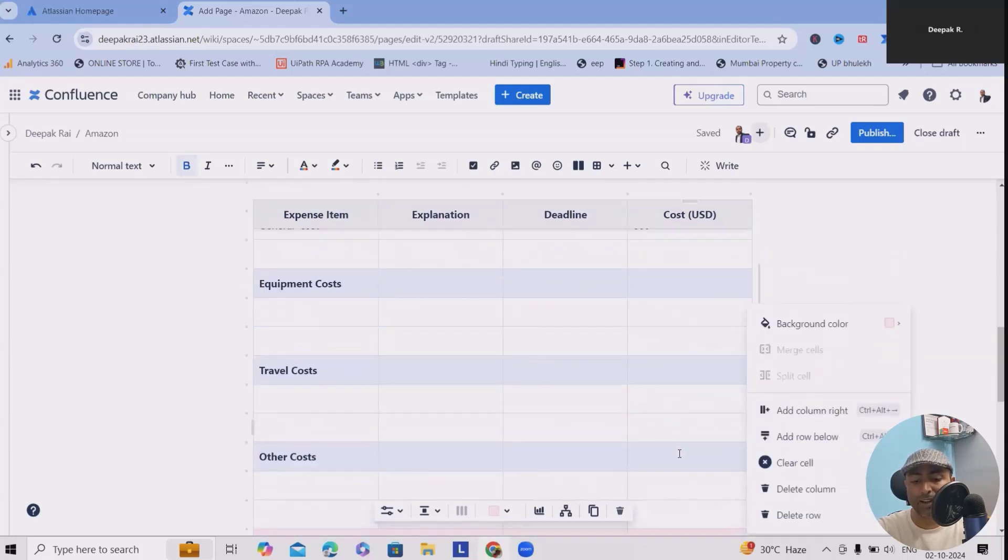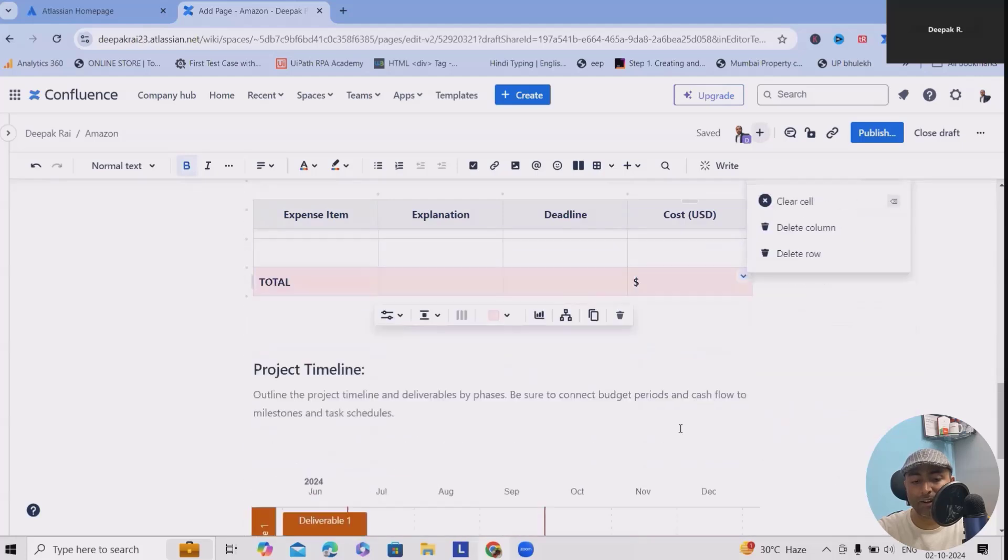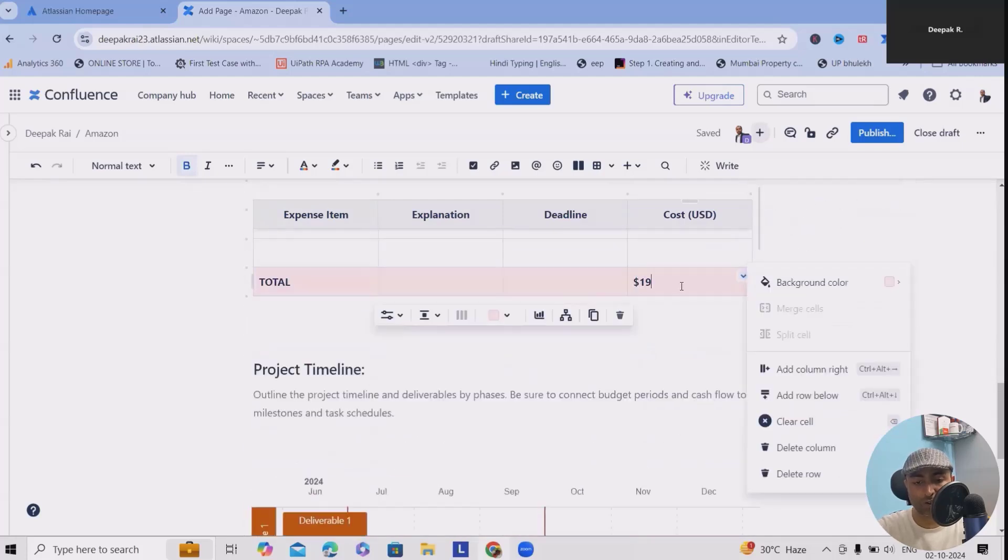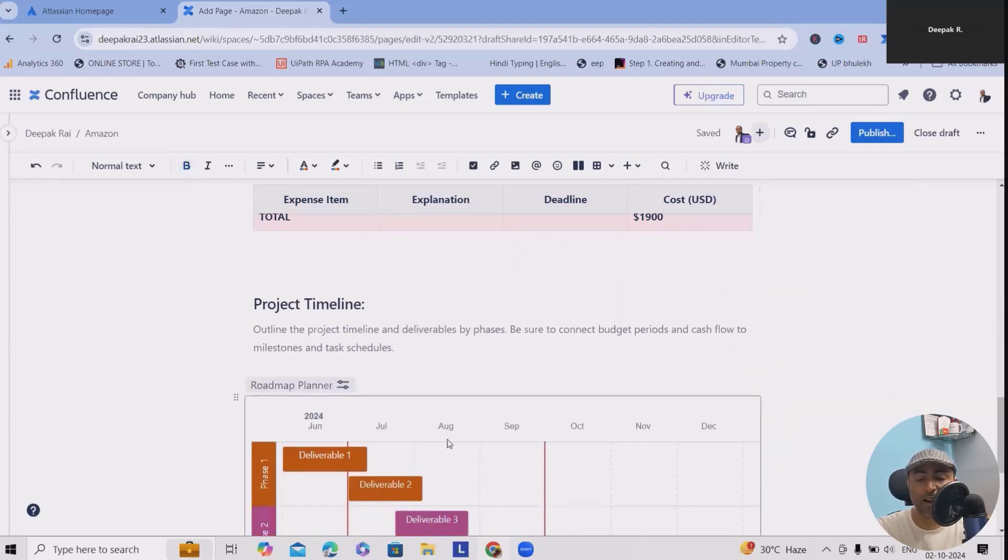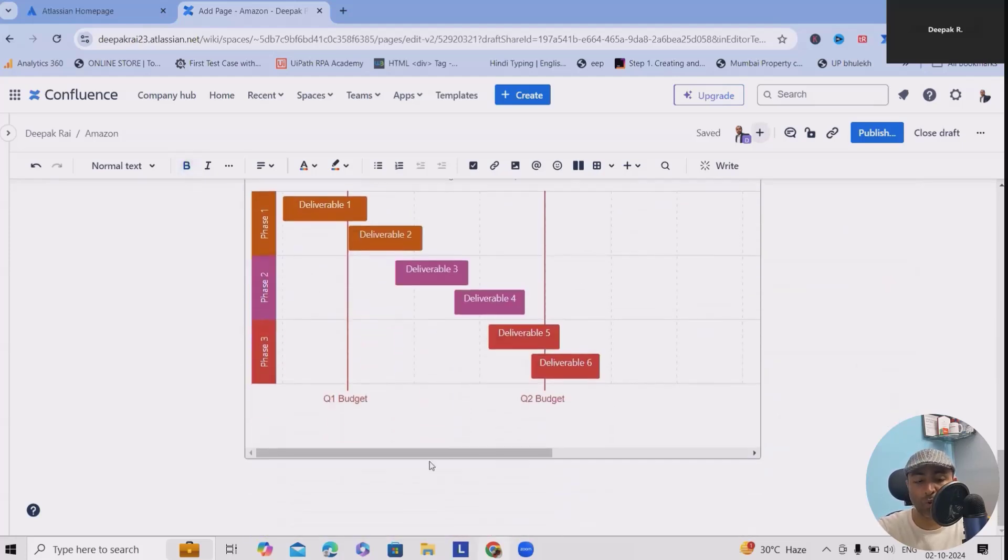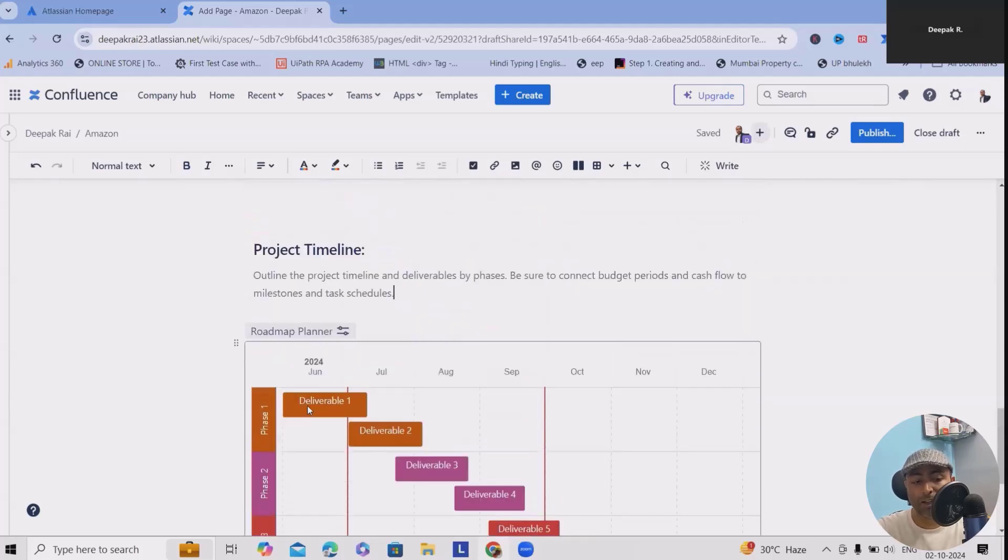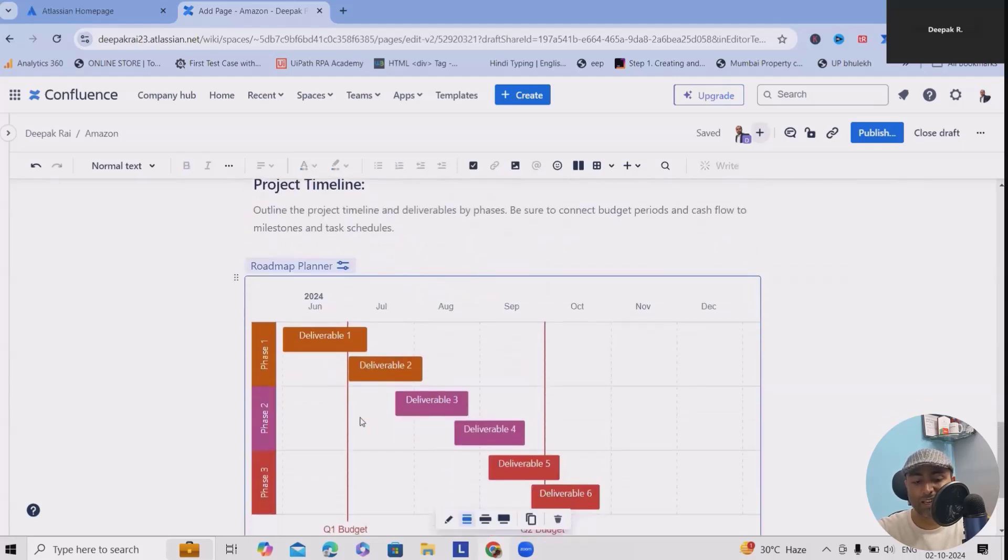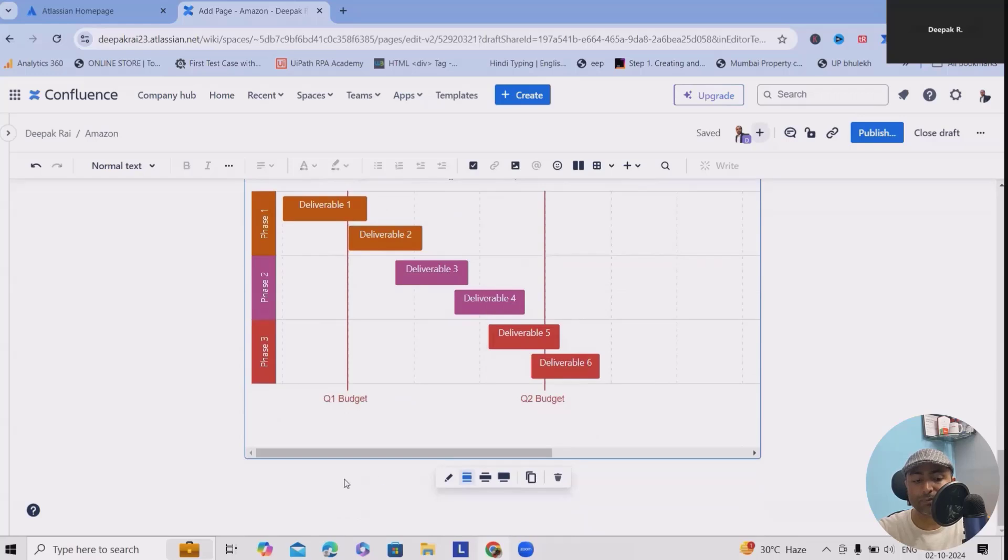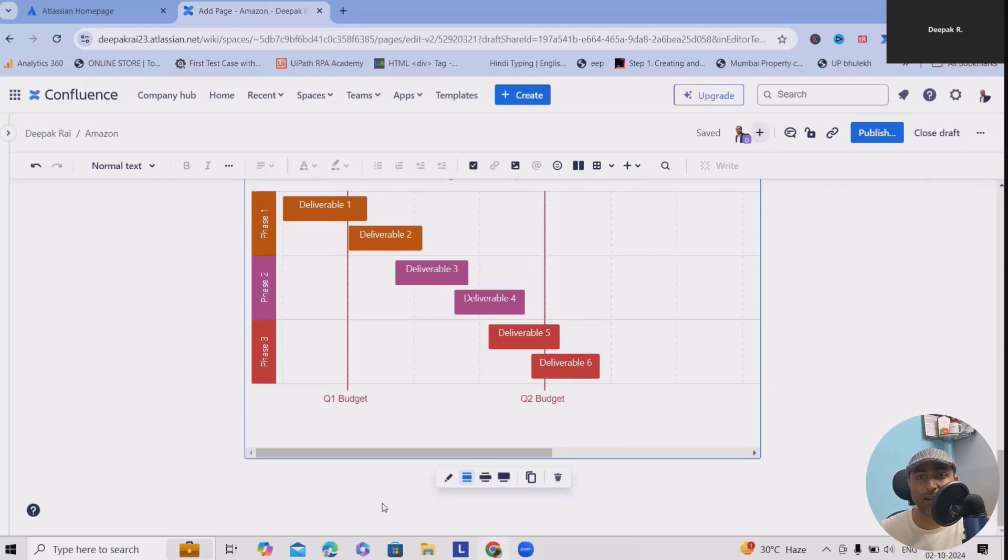Let's consider we have this cost where 1100 plus 800 - $1900 is the total cost which we can define here. Project timelines are totally up to your requirements, how you want to add it, when you want to deliver it. You can add it. As of now it's mentioned as Q1 and Q2, but you can change this view and accordingly keep this planner in place.